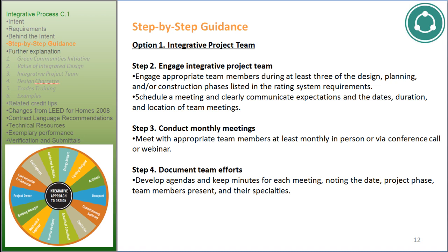Step 3. Conduct monthly meetings. Meet with appropriate team members at least monthly in person or via conference call or webinar. Step 4. Document team efforts. Develop agendas and keep minutes for each meeting, noting the date, project phase, team members present, and their specialties.